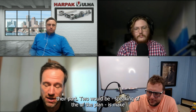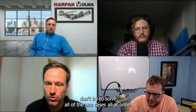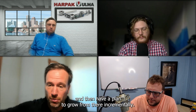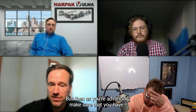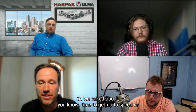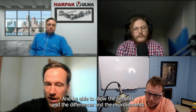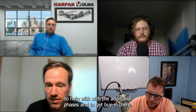Two, speaking of the plan, is make sure that you have a strategy that has two aspects to it. One is a phased approach. Don't try to solve all of the use cases all at once. Start with training, or start with a simple inspection procedure, and then have a plan to grow from there incrementally, adding more and more as you advance. The second aspect is to make sure that you have clear KPIs and things that you can measure. We talked about time to get up to speed, or the number of errors being reduced compared to the old way of using paper-based instructions. Be able to show the benefits and improvements from those initial phases to help with the additional phases, and to get buy-in.